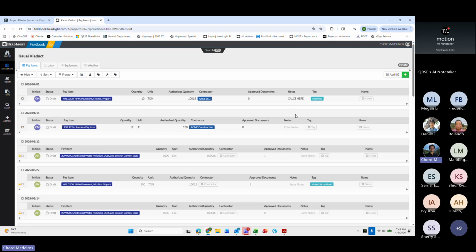So that is one of the best practices that we were seeing. People are notating lump sum items, yet they are not entering in the notes here. They're seeing that there's a unit price of 1, and they are not entering in any notes here to help the quantity adjustment at the end of the month. So overall, any work that is being tracked needs to correspond to a pay item. So it needs to be notated down here, and we need to be filling out all of the applicable fields here. And in most cases, all of the fields are applicable.